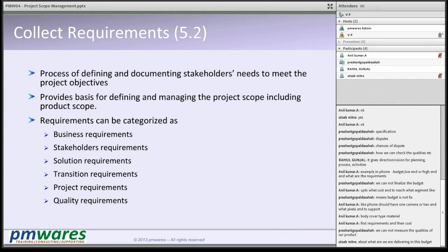In many projects, define scope happens first and then you collect the requirements. In many places, you may have an opportunity to collect the requirements first and then define the scope. The right process is you collect the requirements and define the scope, but the fact of the matter is that you have to submit the proposal first, the customer will accept it, and only then can you do the detailed requirements. So once you have submitted the proposal, your scope is already closed.